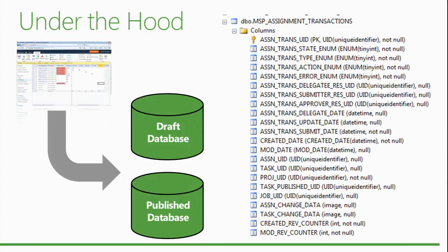For the task update though, it's tougher because you don't have a lot of information in a reporting database. Actually, you have none. You don't know where the task update is in the process. You don't know what happened to it. You don't know if it has been approved or things like that. You can only deduce these things from what comes out at the other end, that is the reporting database. If it's not there, then what happened to it?